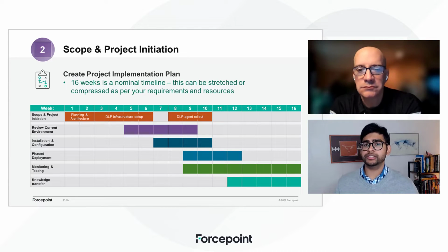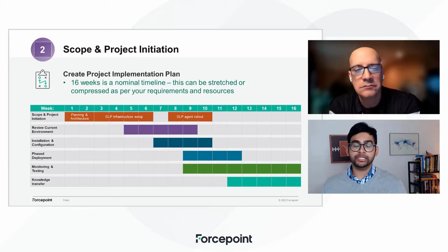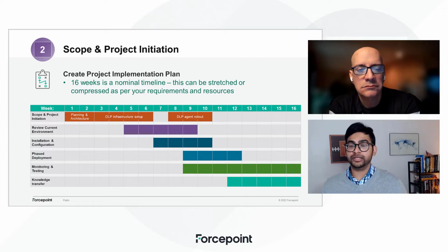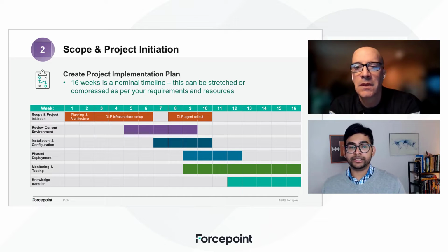Because what you do want to do is you don't want to right off the bat have a block policy and stop business from occurring, especially if you don't have a DLP system in place. And that can add complexity, and it's more of a one step forward, two steps back. So what we're really trying to do, because it is 16 weeks, is help with monitoring, testing, monitoring and testing, iterations of fine tuning the rules to make sure when we do add beyond just audit, whether it's a confirm option, whether it's notify or just block, it's blocking the right things.